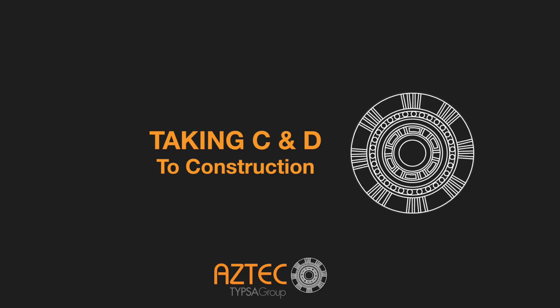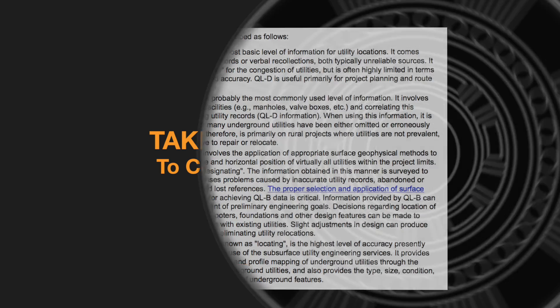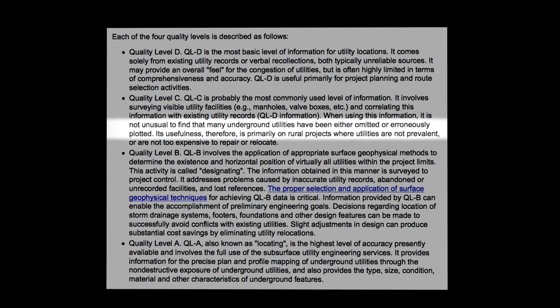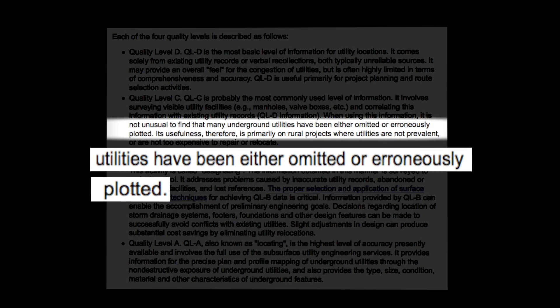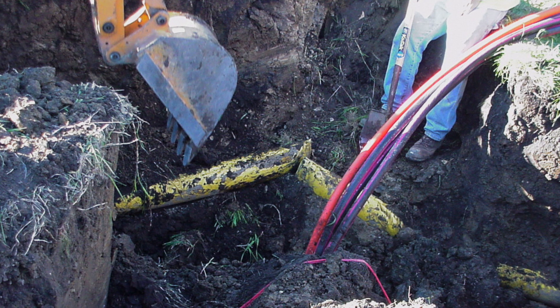Due to their unreliability, levels D and C alone are no longer widely accepted. The FHWA reports historically a 15 to 30% error or omission rate with level D and C alone.